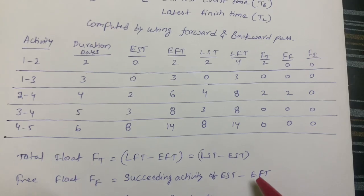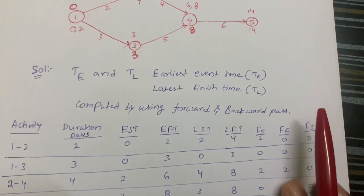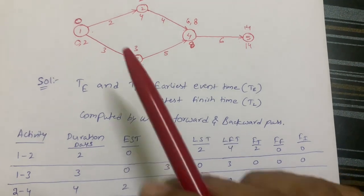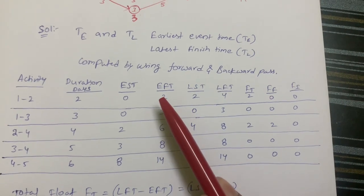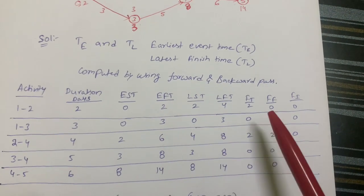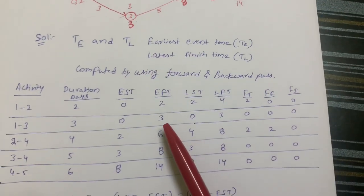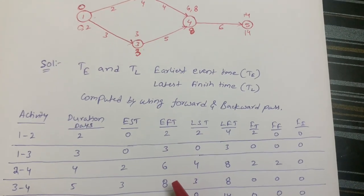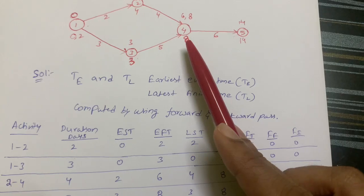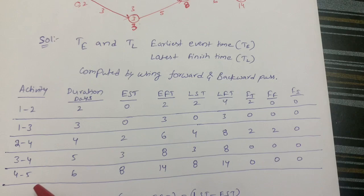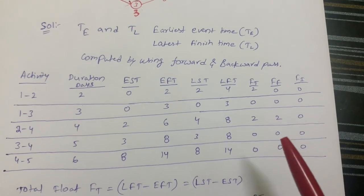Free float is calculated as: EST of succeeding activity − EFT of current activity. The succeeding event of 1-to-2 is event 2, so 2 − 2 = 0. For 1-to-3, succeeding event is 3, so 3 − 3 = 0. For 2-to-4, succeeding activity EST is 4 and EFT is 6, so 4 − 6 = ... wait, the value is 6 − 4 = 2. For 3-to-4, 8 − 8 = 0. For 4-to-5, 14 − 14 = 0.